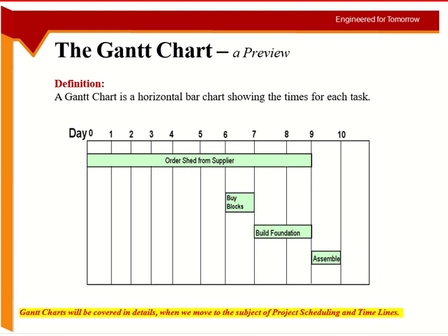If they bought the blocks here and were planning to build the foundation on the 7th day, they would have to take care of the blocks for 7 days and store them somewhere. But in this case they can just leave it in the vehicle, because the next morning they will start building. So you don't need proper storage for that. You are managing your resources effectively.